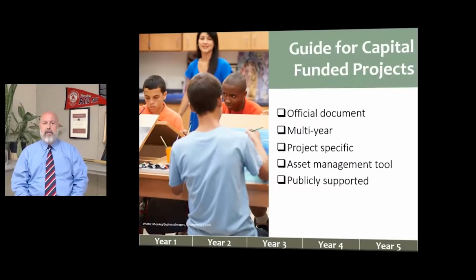The capital improvement plan, often called a CIP, documents the approved uses for capital funds. These funds make it possible for school districts to deliver healthy, safe, and educationally inspiring facilities. The capital improvement plan is also a planning and fiscal management tool that coordinates the location, timing, and financing of projects over a multi-year period, often 5 to 6 years, but it is updated annually. The capital plan implements priorities of the Educational Facilities Master Plan.